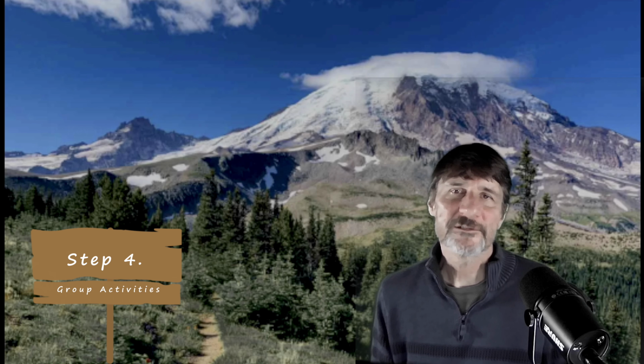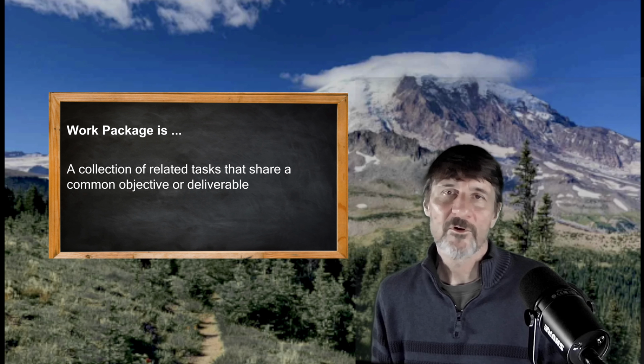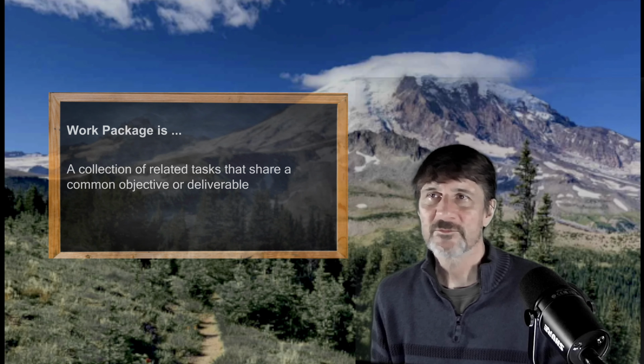The next step, step four, is to group similar activities. Group tasks or activities that contribute to the same deliverable together in a logical sequence to improve clarity. These groupings of similar activities will ultimately become a work package for the roadmap. And then should we create a project plan, they would essentially be used as work packages for the project plan. And, as I mentioned, they should contain like activities. By like or similar, we mean where similar resources are going to be used to develop, create, implement, and likely similar meetings, workshops, etc.